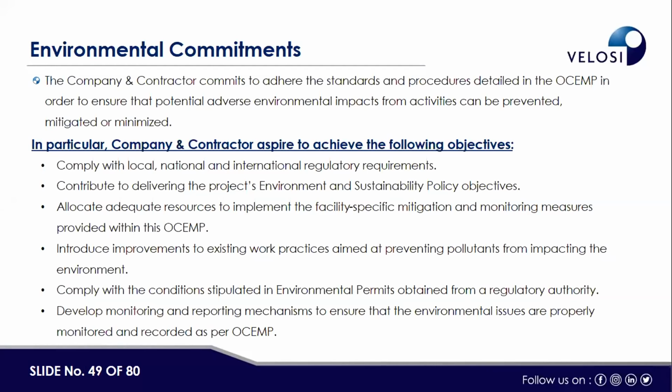Next question. How to distinguish between EIA and CEMP? Because EIA itself is a detailed document. Yes, in the beginning I explained that it depends on the region and on the authorities. In some regions or with some authorities, even after the approval or development of the EIA, the authorities may ask for the development of the EMP, either before the construction or before the operation. Yes, EIA is a complete document that also details the management framework. But again, for further enhancement of the document and to further reduce the negative impact, the authority may ask for the development of the environmental management plan.